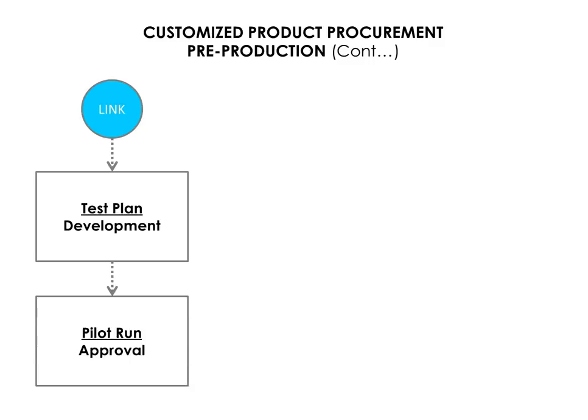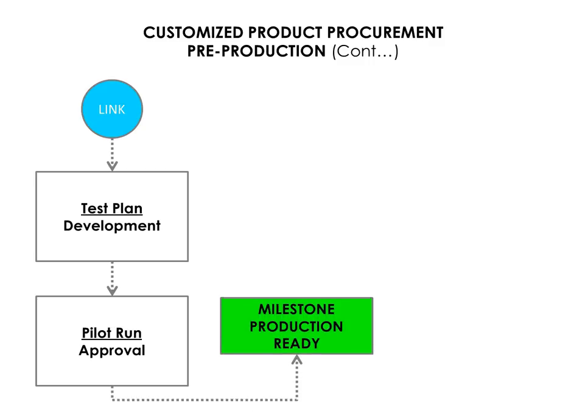The last step in the pre-production phase is to conduct a pilot run. This should be conducted with the intended mass production setup including all of the correct tooling, test equipment, procedures and processes that will be in place, as well as the actual operators that will be assigned to build your product. A trial run may involve a number of different runs with iterative improvements between each of those runs, which ultimately results in the process being signed off as production ready. This will be your milestone in your project plan for production ready state.